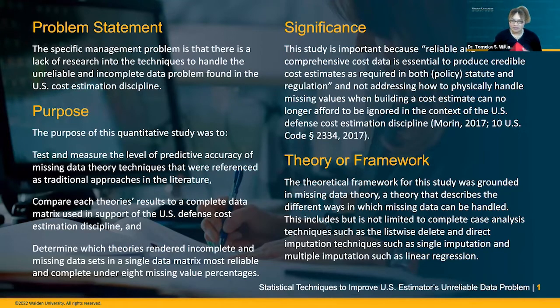Over the years, I've been a cost estimator, like I said before, for about 23 years. My first duty station was LA Air Force Base, where I did Titan missile rockets. The continuous problem that always seems to come to bear is, do I have enough data, or where am I going to get the data from to determine how much I should pay for the avionics piece for this year. And then, if I added inflation logic going 40 years out, you come up with that larger estimate of what you're going to spend on R&D, what you might spend on procurement costs, and what you might spend on operations and maintenance. And so that's the world of a cost estimator.